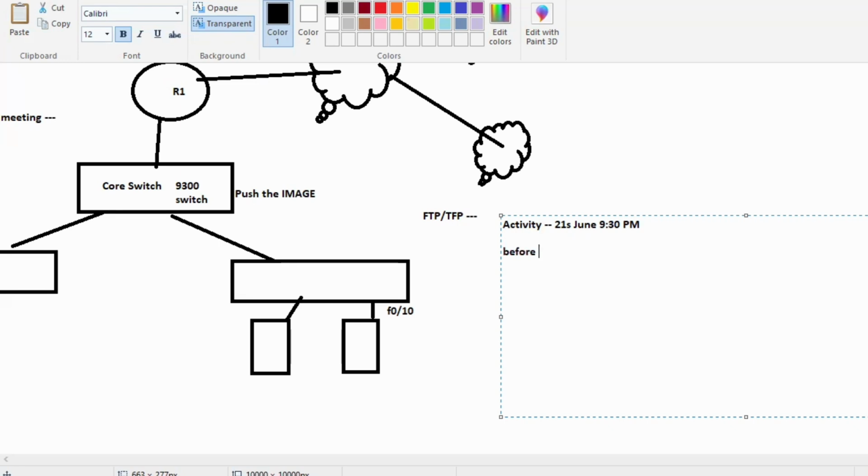before the activity also, what you need to do, you need to take some pre-checks. What do you mean by the pre-check? You are just going to take some backup, so that after the upgrade, you are also going to match whether it's matching or not. Like the running config will be taken as the pre-config, and after the upgrade and before the upgrade, you need to match whether your configuration is the same or not, right?